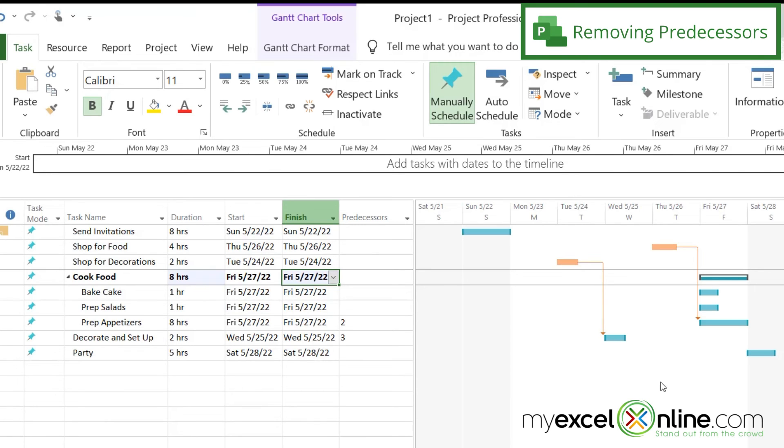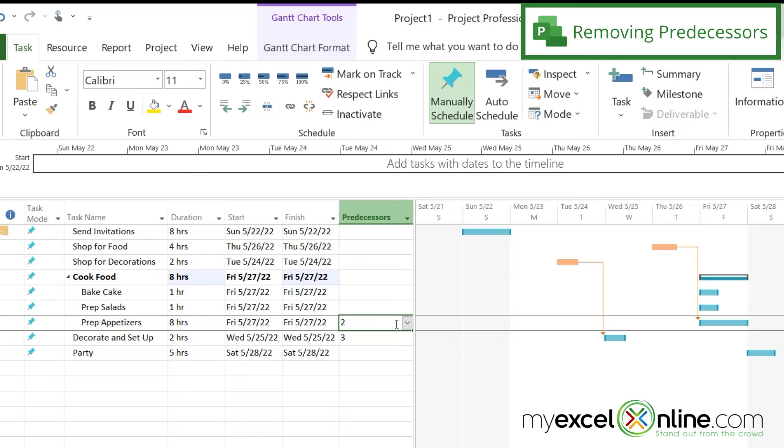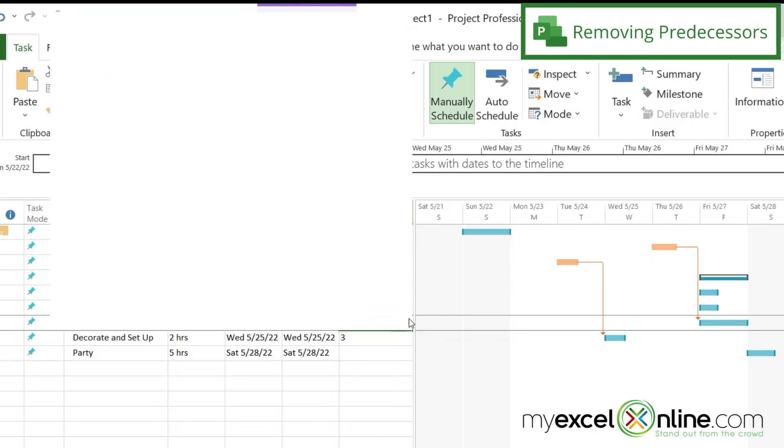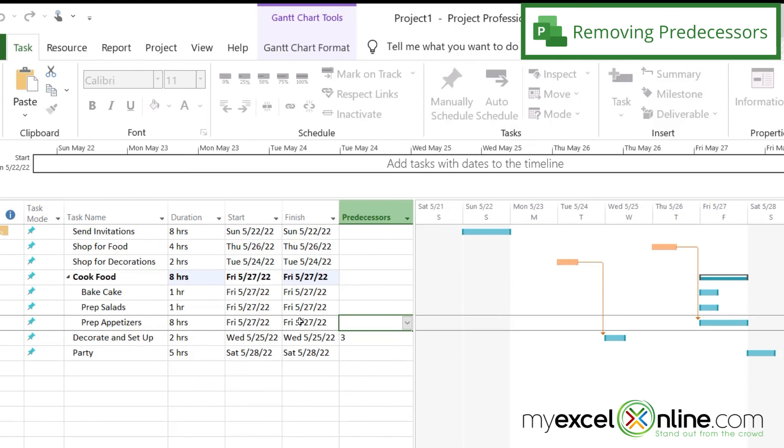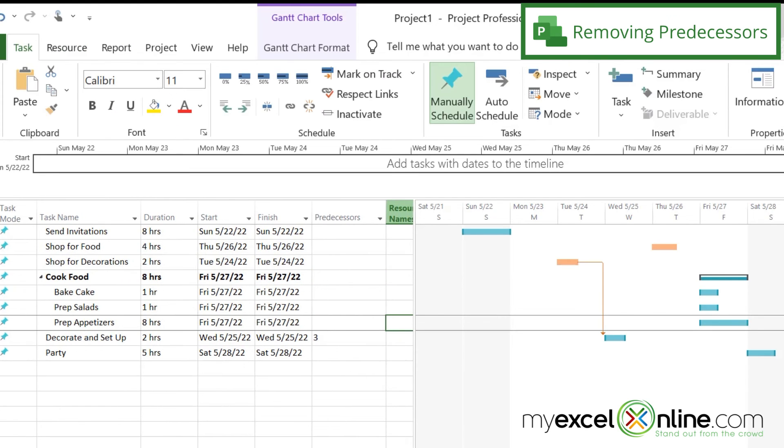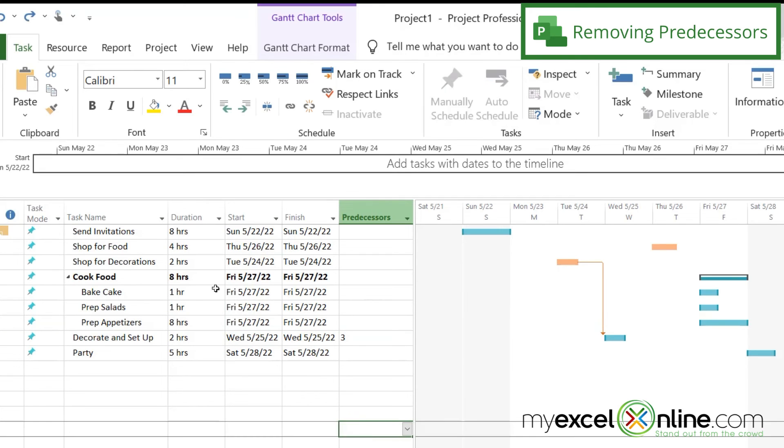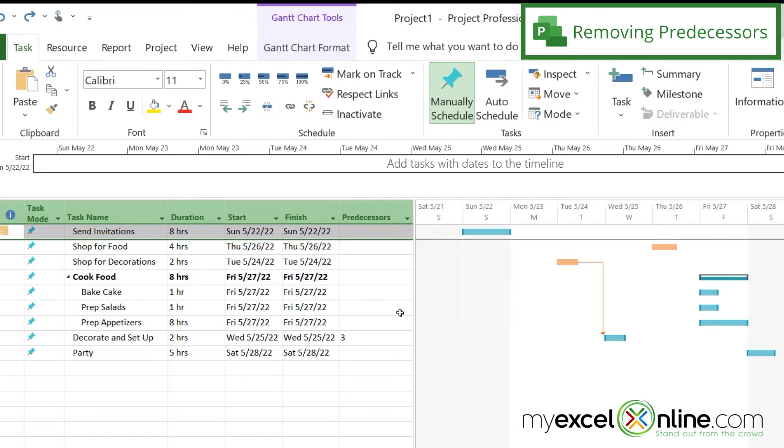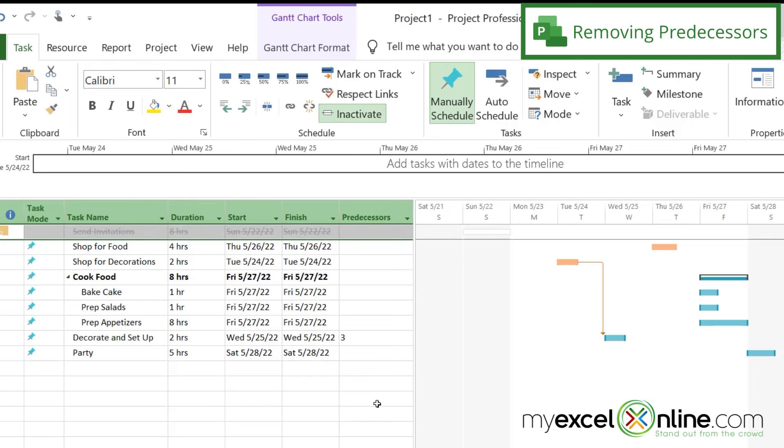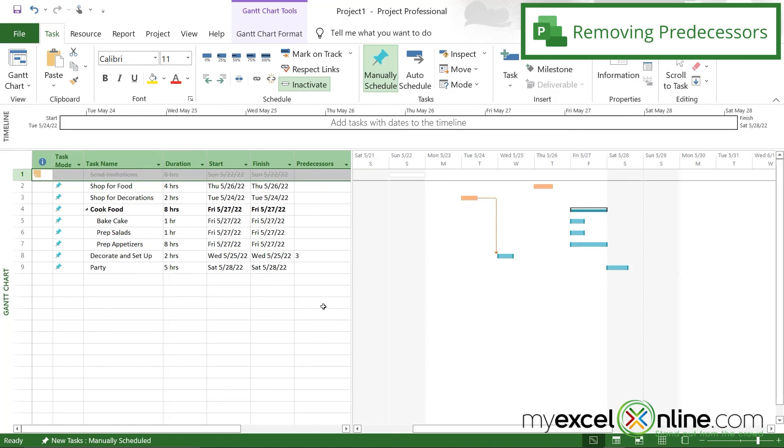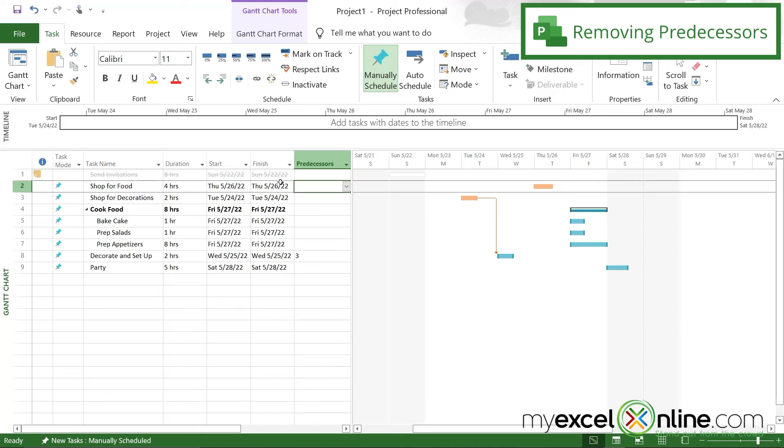If I have a dependency on here that I no longer want, I can just go over here to predecessors and delete that predecessor, and you can see that that arrow will go away. I can also highlight a task and go up here to inactivate, and it will keep my task on this list in case I need to come back to it later, but it will cross it out here and make the box on the Gantt chart a white box to indicate an inactive task.